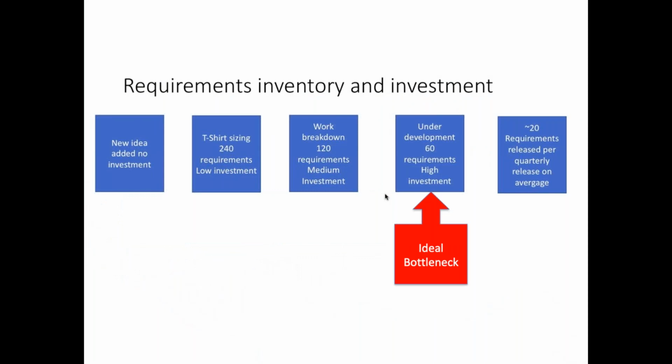And what we found before we made the transformation is that we were using about 20% of our capacity just to do planning. After we did the transformation, we went to only using 5% of our capacity for planning, and in the process, we released 15% of capacity that we could focus on delivering throughput for our customers and value for the customers.